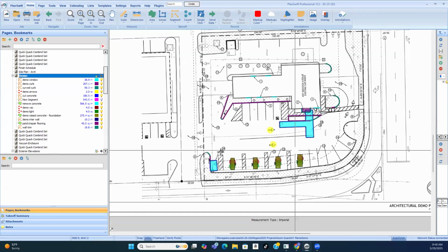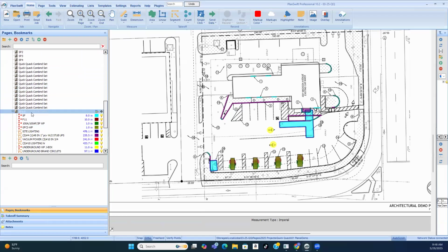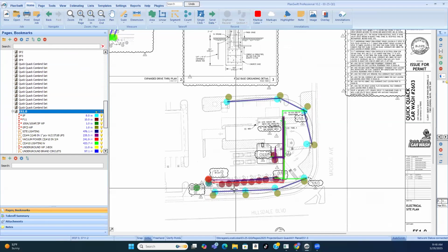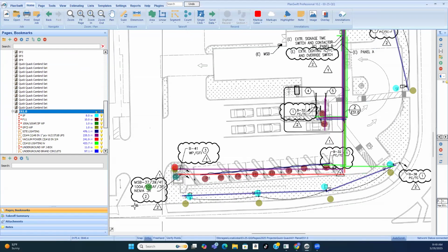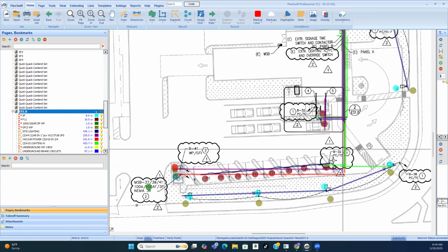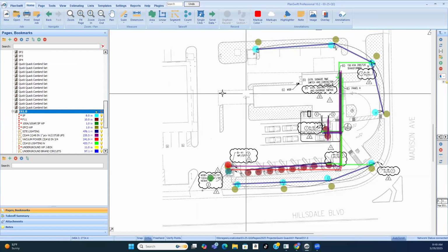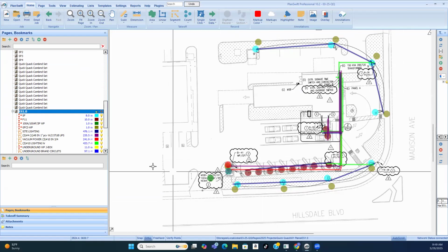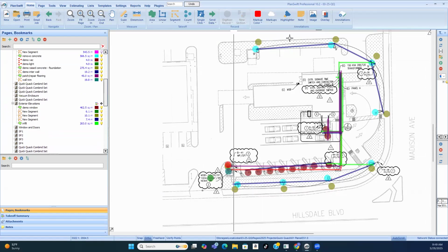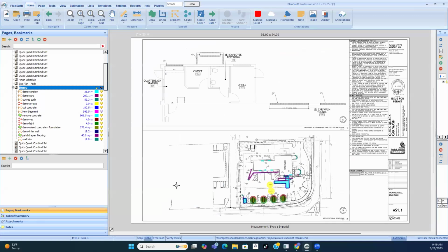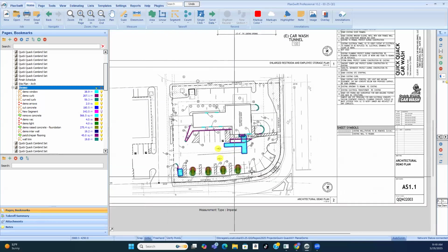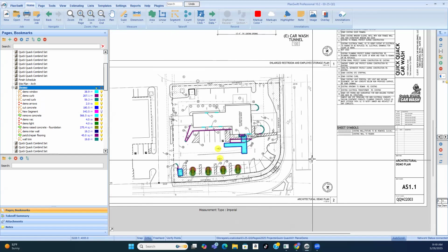Because again, let's go back to the electrical. That's why you got to be able to go through to see what these fools are talking about. You see that all of that is going in the same direction as those broken lines from the end of the parking lot right here. Because see, look, this is where they drive out where they say don't replace that concrete or whatever. But then let's go back up, put on your photographic memory. See, that's electrical. And then the demo, all these broken lines running the same way. So that's a trench cut.